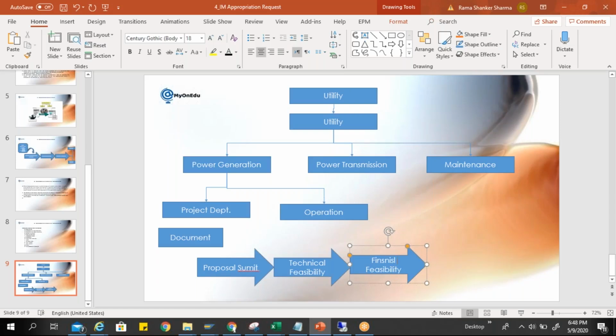Management has to decide on the options as per their experience. Once it is approved, whether option 1 or option 2, it depends on them. Then it will go to the further phase of execution, or detailed planning. So all these things you can manage within the appropriation request. And when you are giving the final approval of the appropriation request, you can have an arrangement to transfer this object into a PS project or an internal order,